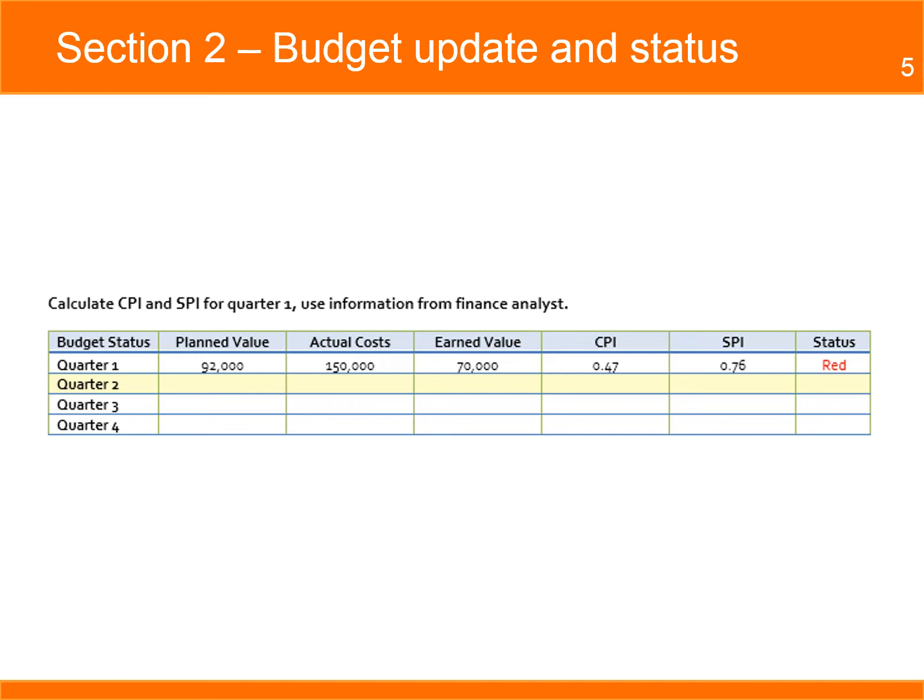When both CPI and SPI are below 1, the status is red. Budget data will be provided every week to help you calculate the index values.